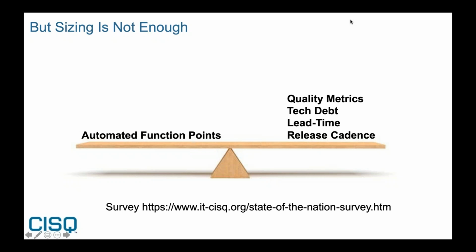The technical debt one. Going back many years, I did a project where the new Scrum team we put up delivered less than 8% technical debt per function point, at a time when one of the legacy teams was nearly 40%, but they were a legacy system. That was really important because it helped internally win the argument of pushing down the Scrum vote. Even though the guys didn't want to use function points, in the end they were very pleased because it helped with the business case of adopting Agile and DevOps.